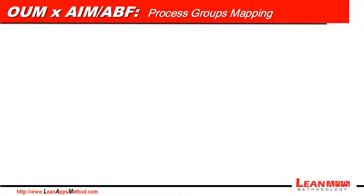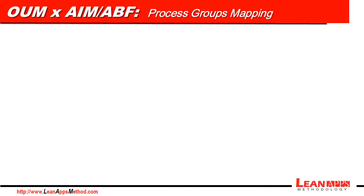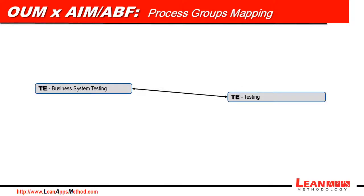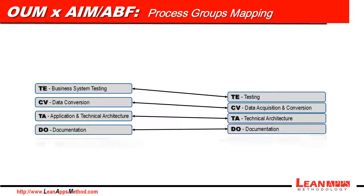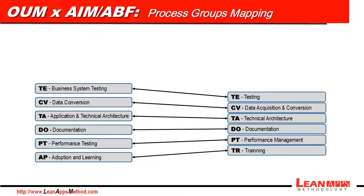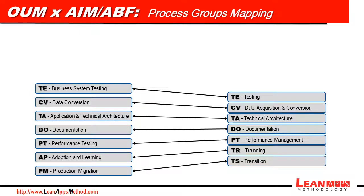In this slide, we can see all the process mapping between AIM and OUM. System testing is basically a one-to-one relationship, as well as Data Conversion, Application Technical Architecture, Documentation, Performance Testing, and Adoption and Learning with Training — these are basically the same, with differences only in names. But Production Migration is now split into two different processes: Transition, which moves the system to go live, and Operations and Support, which mainly supports the system after go live.